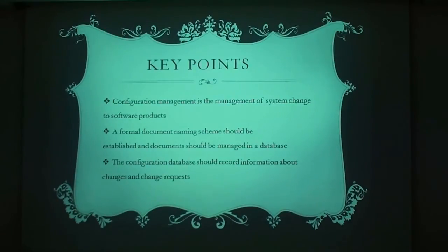So the key points of this presentation were: configuration management is the management of a system's change to the software products, and a formal document naming scheme should be established and documented before being managed in a database. The configuration database should record information about changes and change requests.